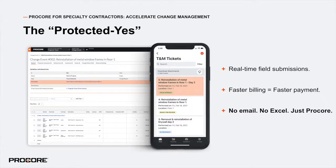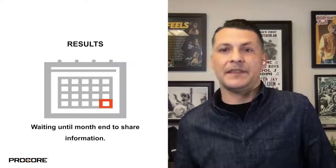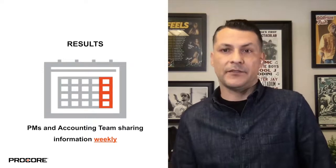And what does this mean for us? It's sort of tangible results. For our project and accounting teams, we used to wait until month end to share information. But now our PMs and accounting teams are able to move to a weekly model, if not sometimes daily. This agility has had a significant impact on our cash flow. The faster we get information, the faster we can bill, the faster we get paid.